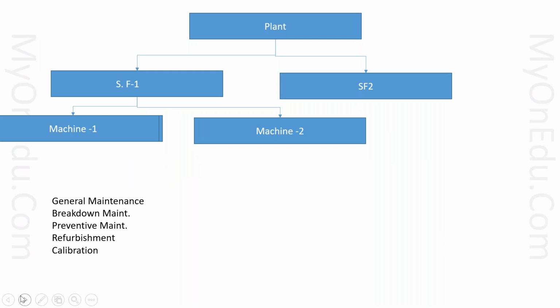This practice you can see in overall projects, generally in plants, where they have an overhaul period. For example, let's say 3 months, in which a certain number of units have to be overhauled, meaning all the maintenance has to be done in this particular period. For that you can create a project, and then create a schedule for doing all the maintenance of individual equipment.